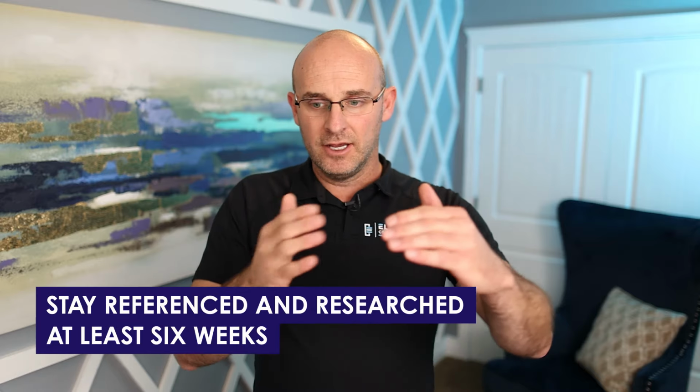Another thing is, if you have a stack of drawings this big and you're overwhelmed, hey, just look out at least, if not 120 days, at least 6 weeks, and stay referenced and researched 6 weeks out. So look at the schedule, what are we going to build, and make sure that you are current on those scopes at a minimum. I highly recommend you go farther out and know more than that, but at a minimum you want to be 6 weeks out, if not 120 days.